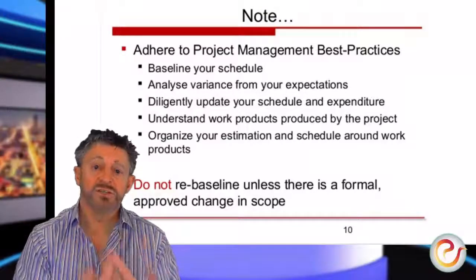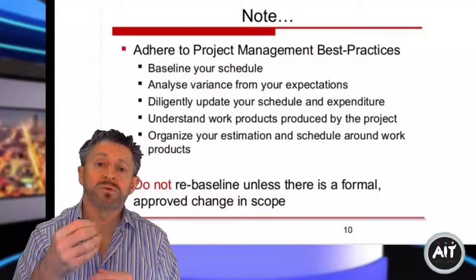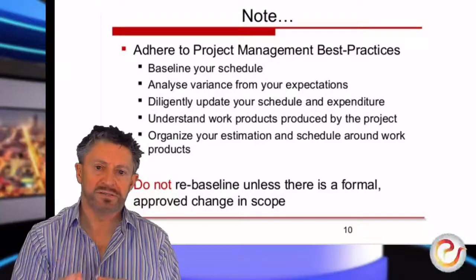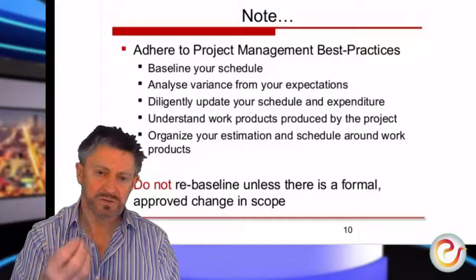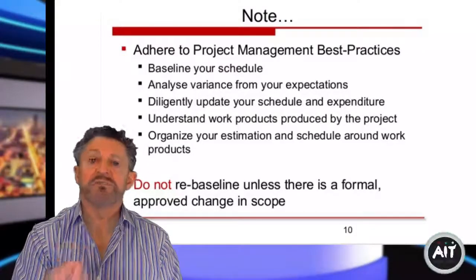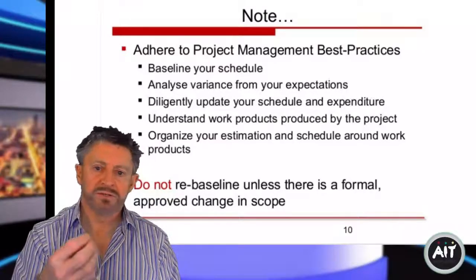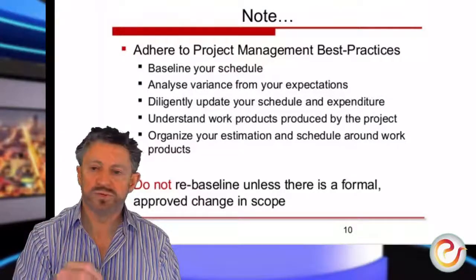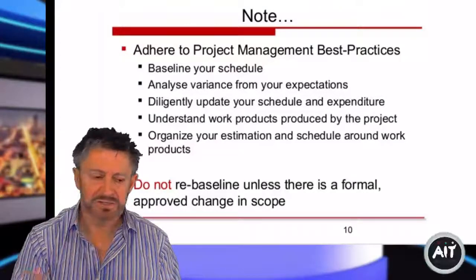We've evaluated the change request. This is what the consequences are. Our investigation or analysis has shown it's going to cost you 7% more on your project, and it's going to take an extra 5 days or 10 weeks or whatever, depending on the size of the change.